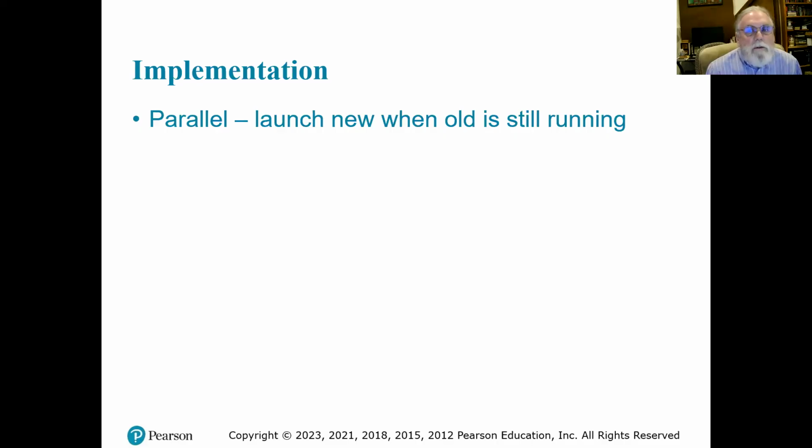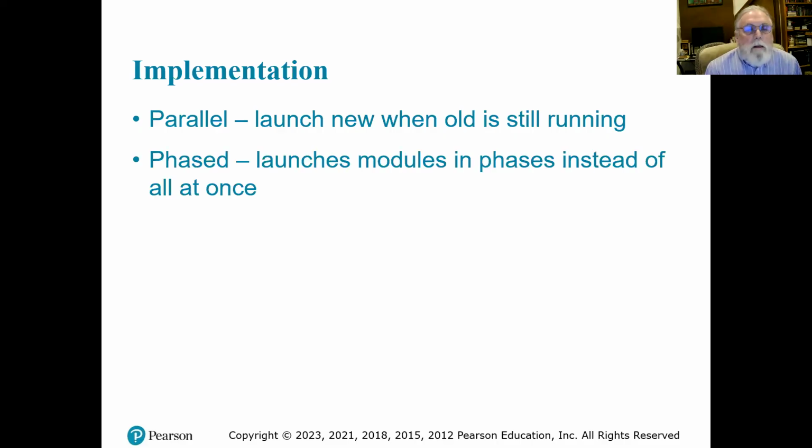You've got both going there. That's great. Another approach is if you were able to break up the system into individual modules to where you could launch individual modules in a staggered mode instead of doing it all at once. That can really minimize any impact to the organization if something doesn't work right. That's not always possible. Depends on how interrelated things are, and if you've made structural changes to how data flows, you may have to do an all or nothing.